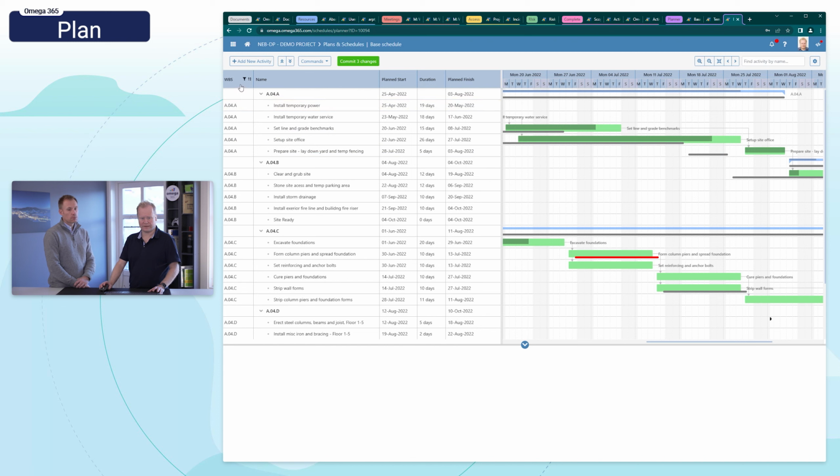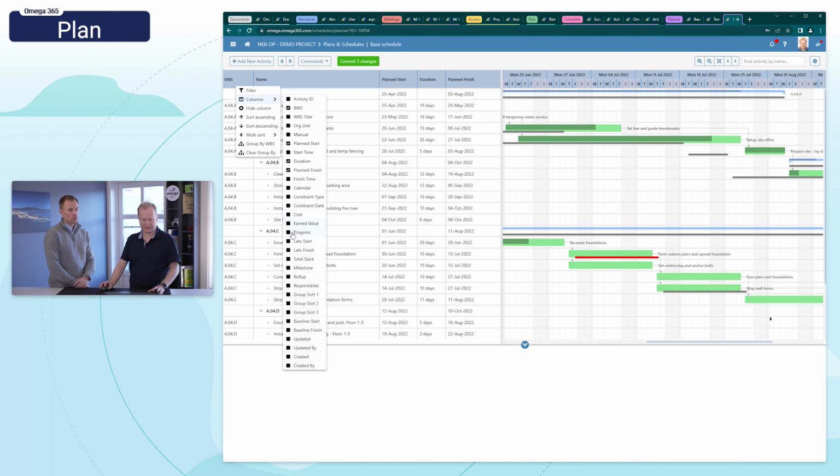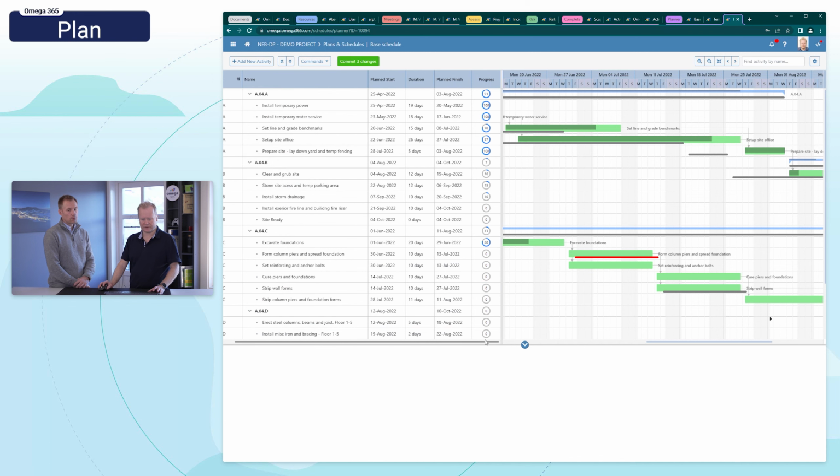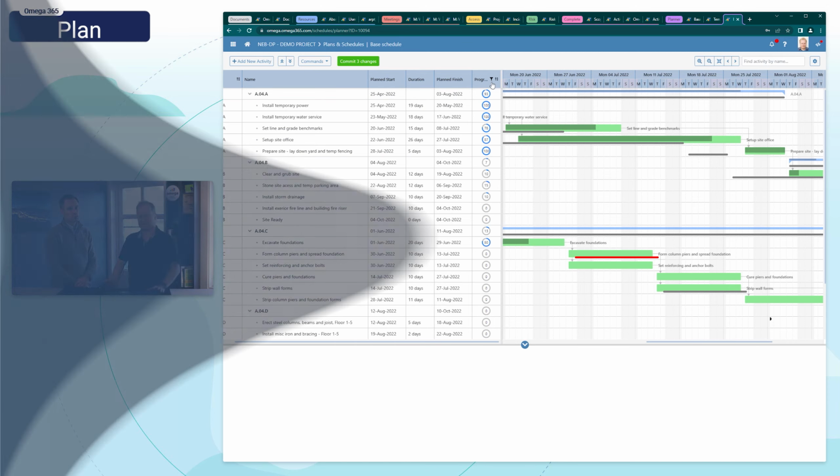Just note one thing when it comes to the progress: when you change the group by, the progress is based on the duration weighting, the standard that is available in the system. We also support cost-weighted calculation of aggregated progress, but that's only when you use the standard grouping that you have defined yourself, basically. But this could be useful, of course, still with different groupings. Yep. But just be aware of that difference.